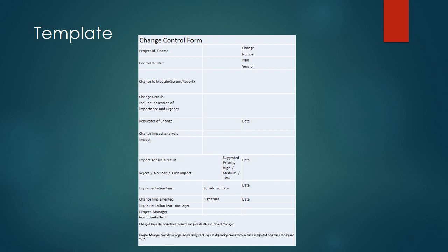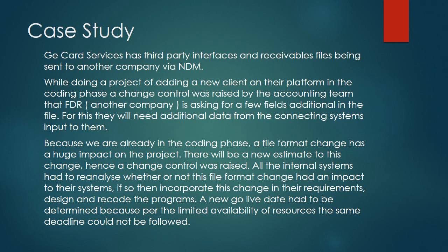This document is very important and it is stored in the change management system, because we should be able to track every change. There is a change number. So when you release the project, you have a change number attached to it. These were the change controls released together in the project. Or if this is an independent release that has been planned for the project, again we will have that change number implemented, and these are the release notes, these are the items and functionalities that are released in this small scale. Okay, let's look at the case study.